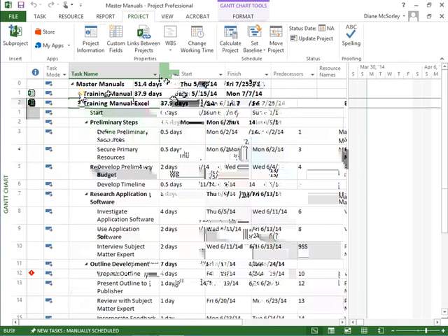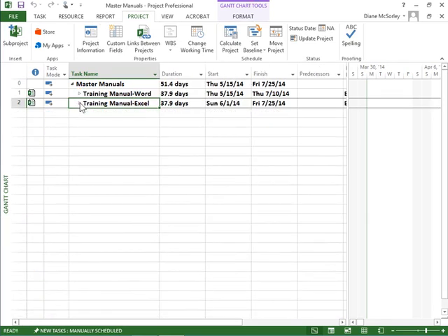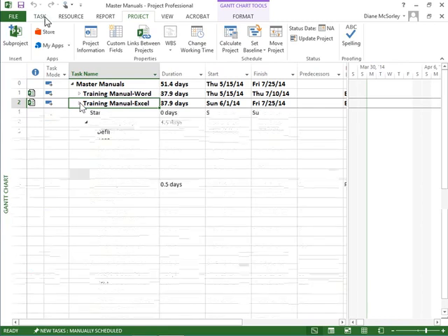Earliest start, latest finish. And this again is just in the entry table. If I went into the cost tables and all the other tables, again, it would roll up and show me totals across the multiple plans. So not only can you bring them in here, you have that roll up information. I can work them in here. If I go into any plan and I mark a task complete, when I save, the save will go back to the individual plan.